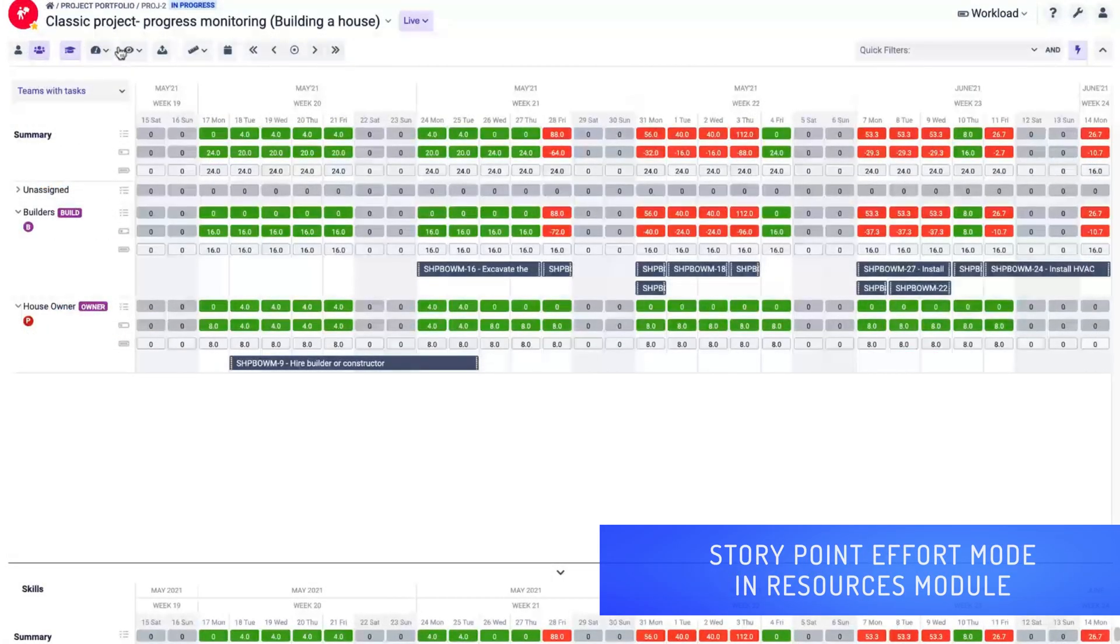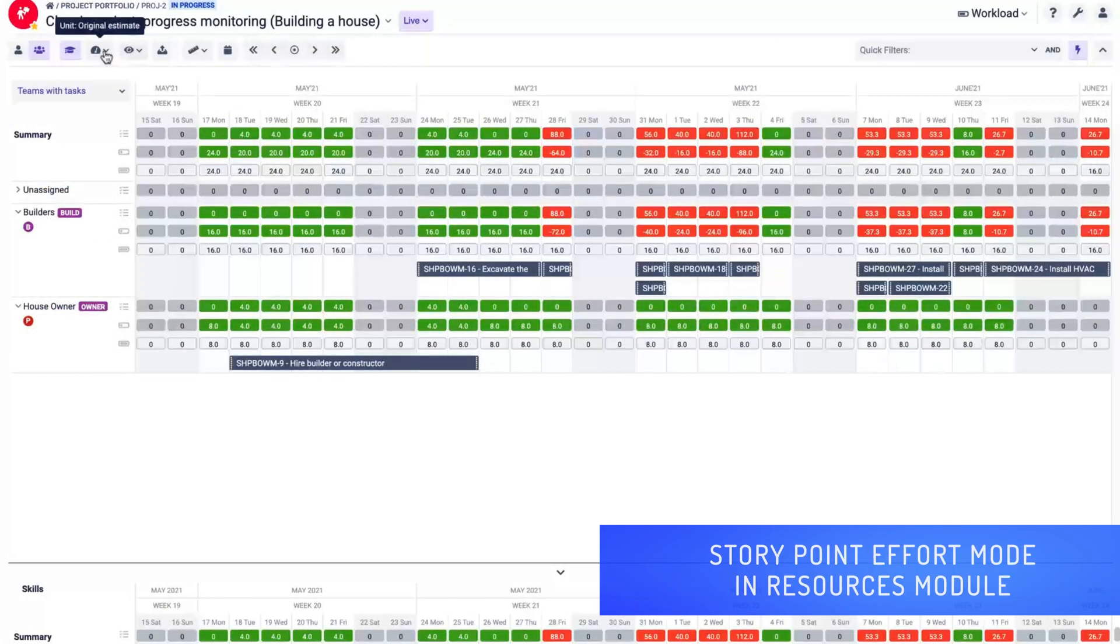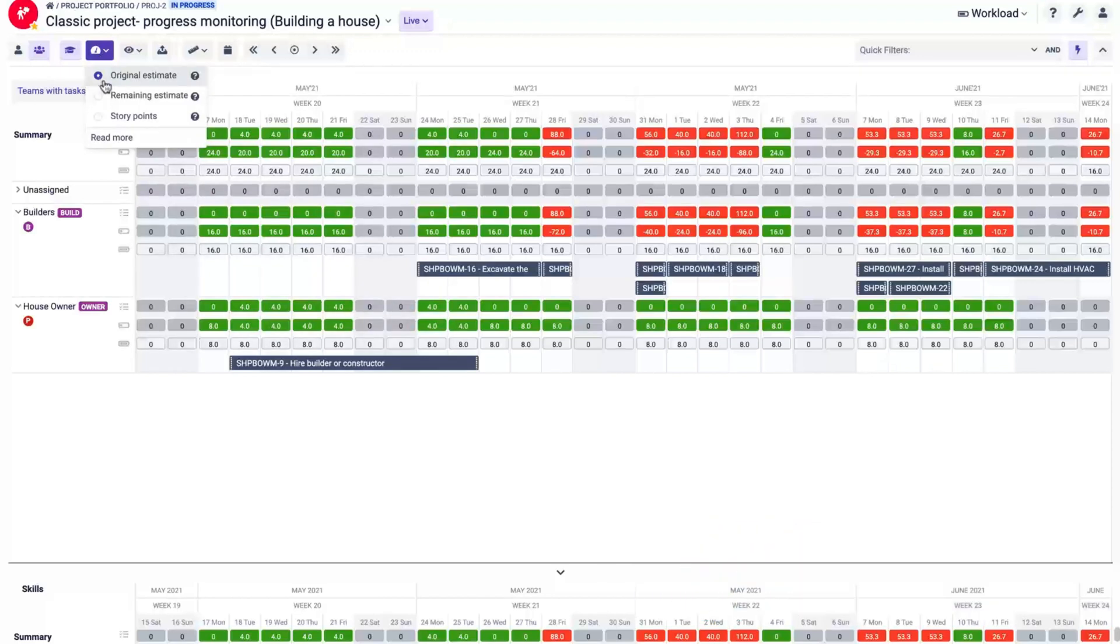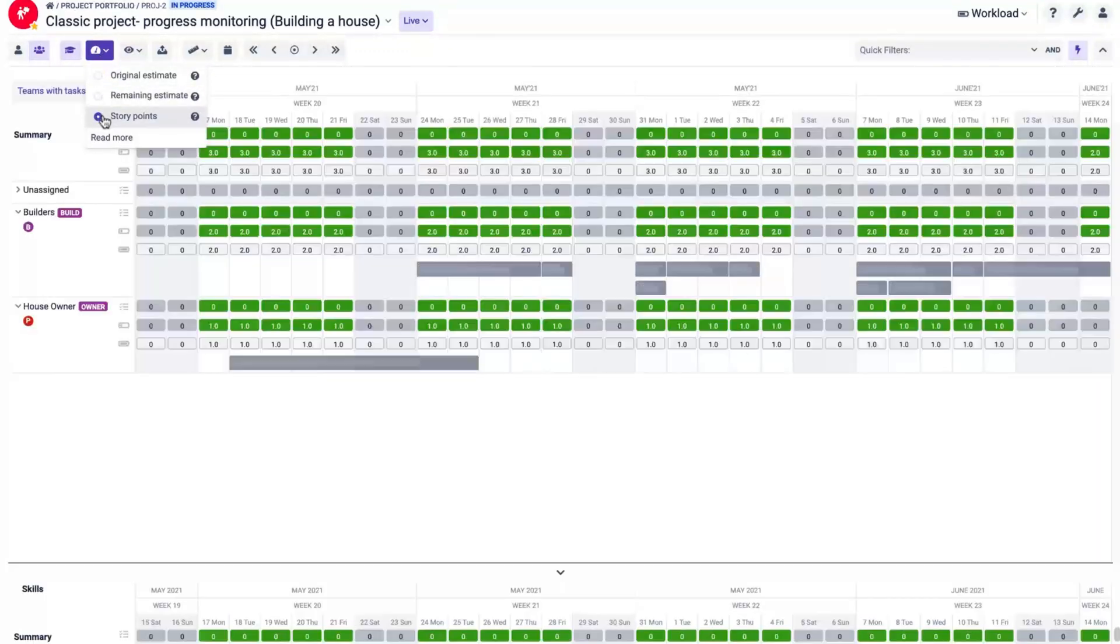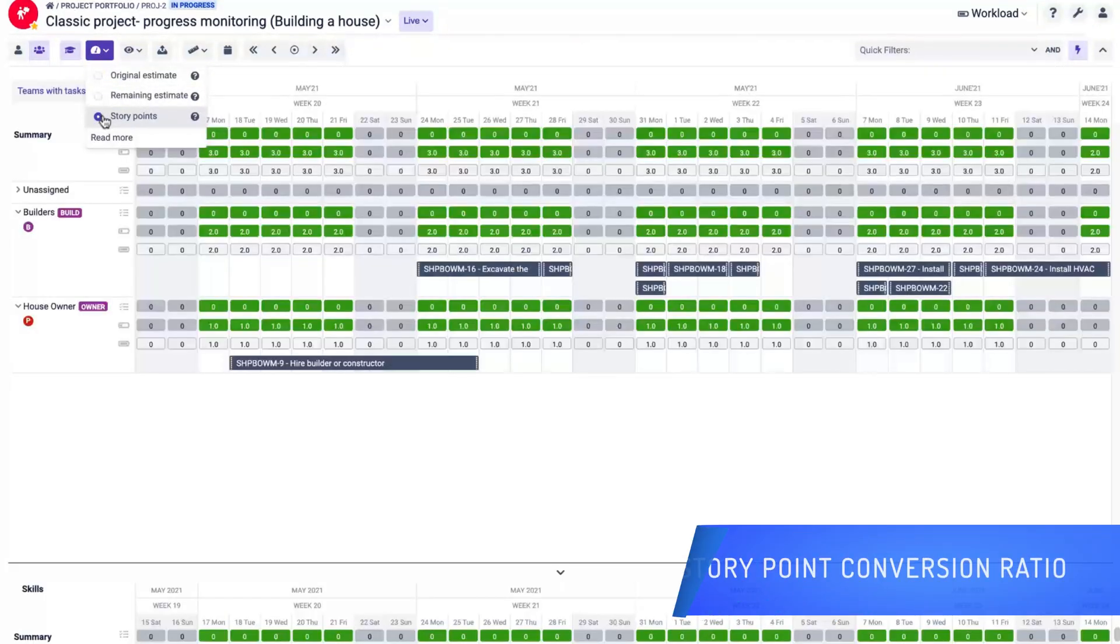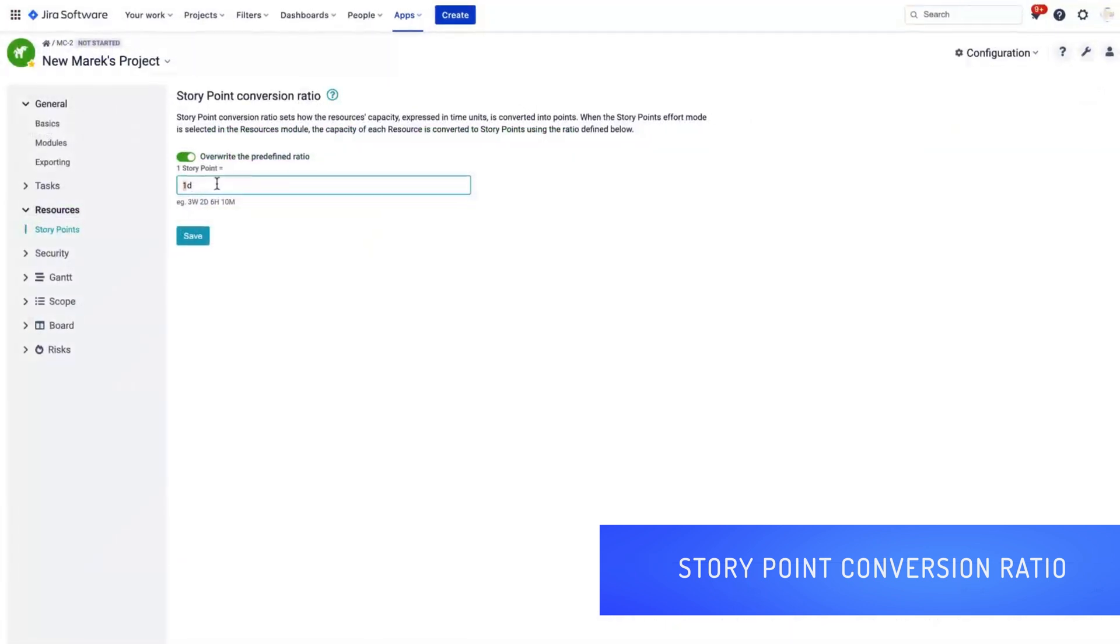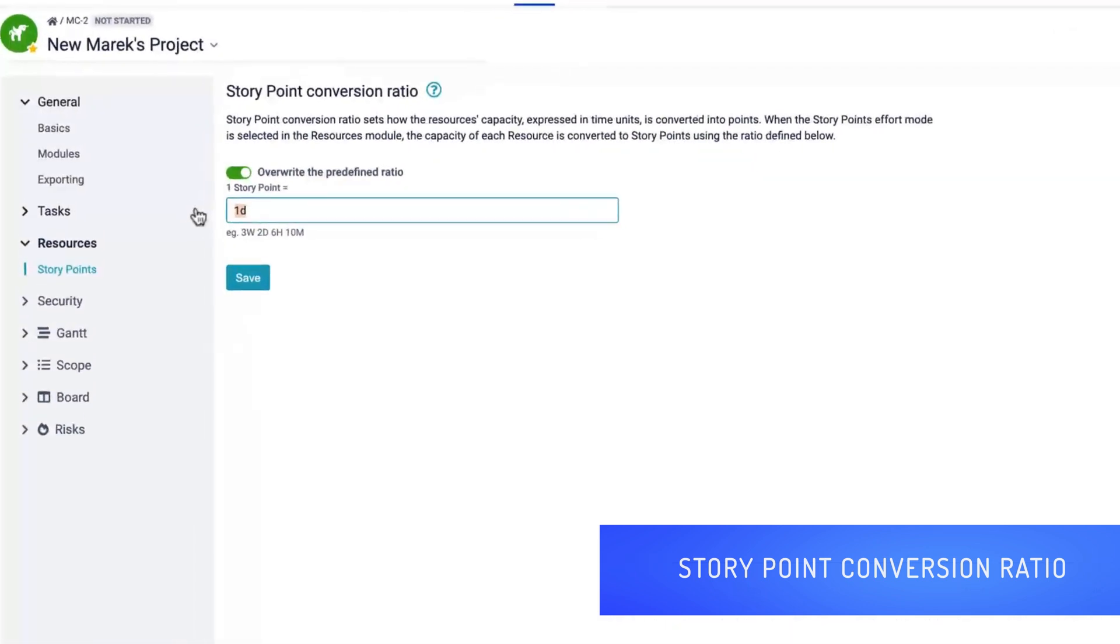You can also switch to story point effort mode and convert the capacity expressed in time units to story points using the conversion ratio.